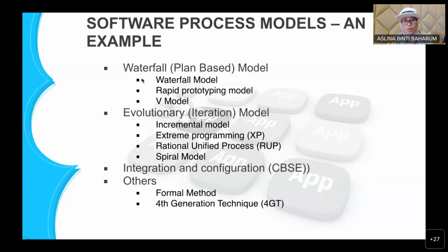However, waterfall is just plan-based. Meaning that if you are done with requirement and then you continue to the design process, you cannot turn back to requirement. That's very risky, okay? Because we know nowadays users are different. Your generation, my generation might be different. So that's why, of course, before, waterfall was famous because it looks easy. Like a waterfall, you know what waterfall is in Malay? Air terjun, right? One way only. So you cannot go back. Can a waterfall flow backwards? No, right, it doesn't go up. But waterfall is only one way.